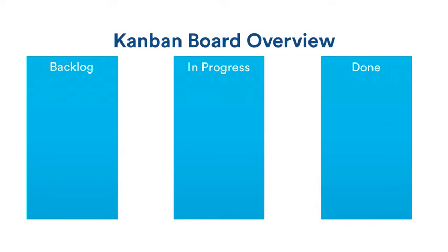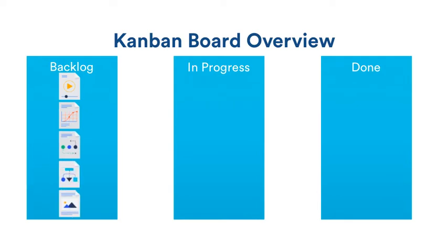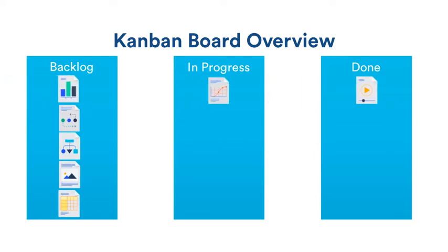I want to explain a bit more about the functions of a Kanban board, just to give you more context about how JIRA software is used. Kanban boards are great for helping teams manage the flow of work. For example, someone like a support queue manager might add work items to the backlog as they arrive. That manager then prioritizes each item so that the most urgent requests appear at the top of the backlog, like this, making it efficient for team members to pick up prioritized items as they have availability to work on them. Kanban boards manage a continual flow of work.